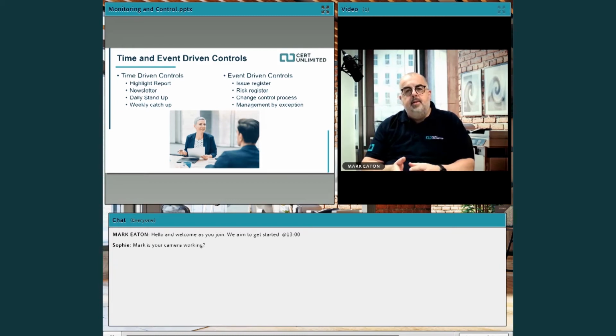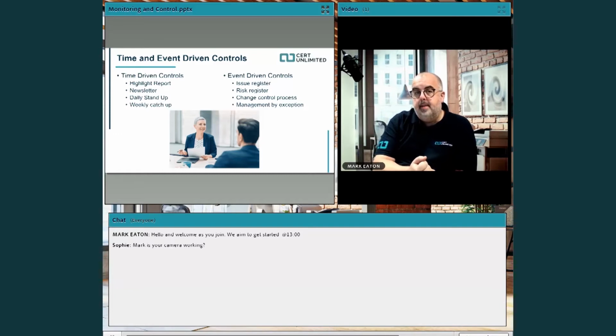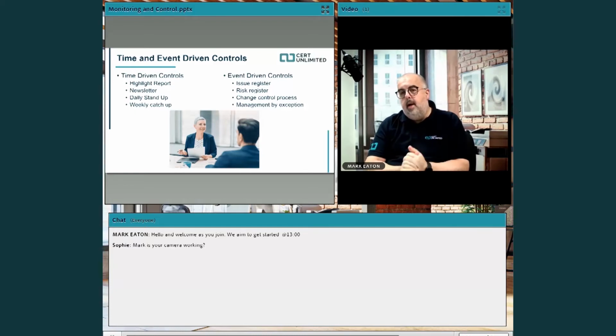Okay? So for example, I'm not a fan of the weekly catch-up, because there's a week where things can happen and your stakeholders aren't aware of it. Whereas a daily stand-up, there's a lot less can happen over a day. Or a newsletter and a highlight report that's kept up to date, that people can access, or a dashboard that people can access on a regular basis. They are time-driven controls, and their job is to communicate, to make sure that stakeholders are aware of where we are. Okay?